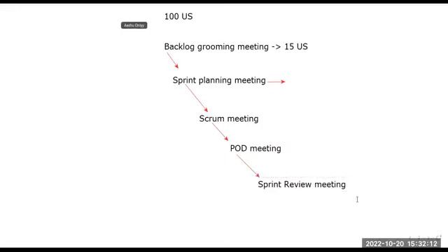Now, after completion of the sprint, what kind of meeting can we conduct? Retrospective meeting. If we have some challenges or mistakes that we observed in this retrospective meeting, then what kind of meeting can we conduct? Root cause analysis meeting.